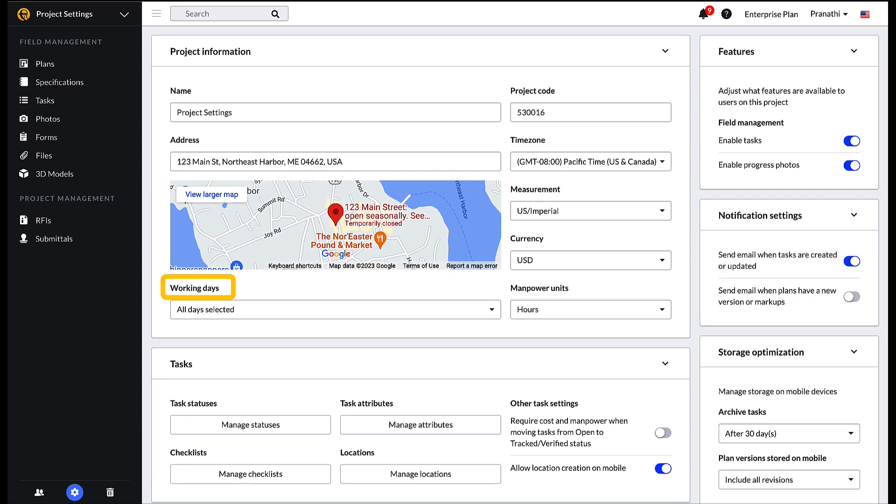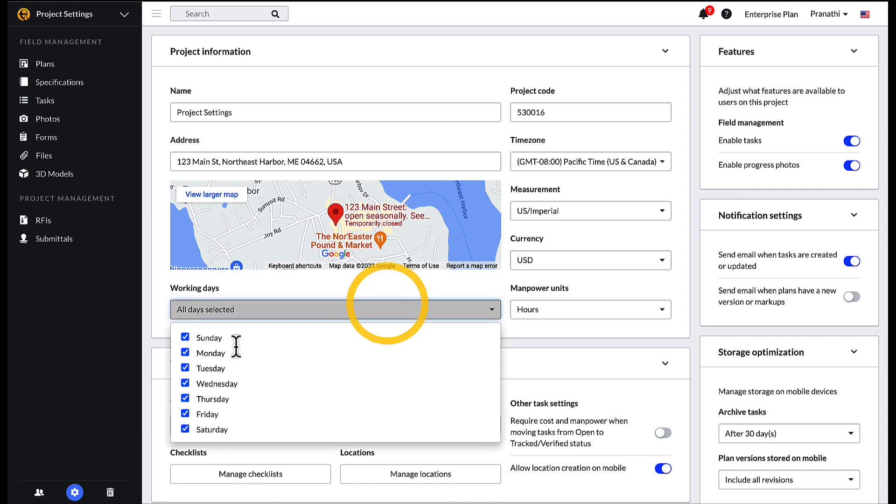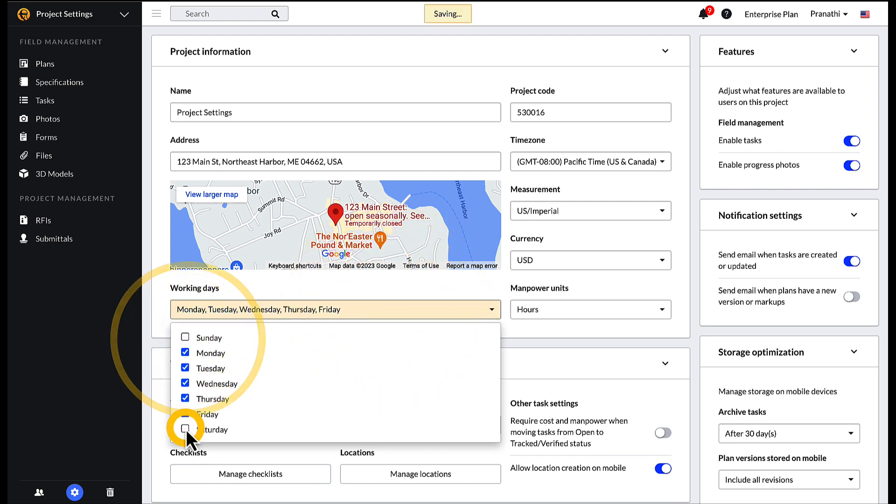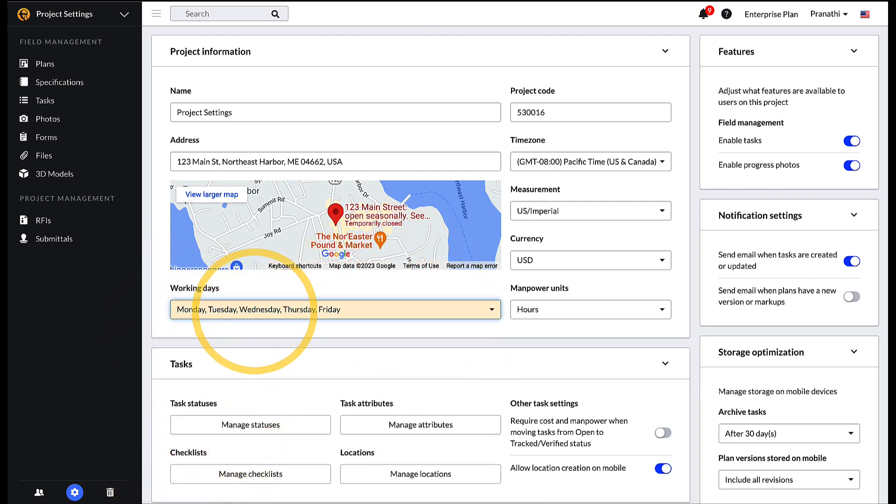Project working days, currency, measurement, and manpower units can also be specified within this section. Project working days affect the man counts on the Gantt chart. Check out the video on task views and reporting to see how man counts can be viewed from the Gantt view.